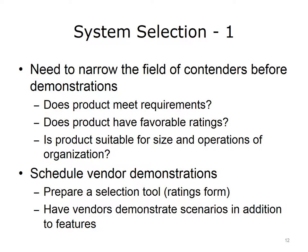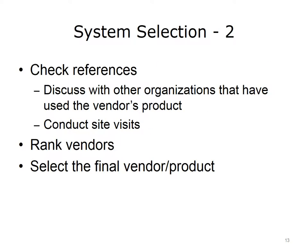During the demonstrations, ask vendors to simulate a variety of clinical scenarios in addition to system features. Requesting the same scenarios from each vendor allows identical workflows to be compared. It is also important to check the vendor's references during the selection process. Find other organizations that have used the vendor's EHR product to get third-party impressions of both the vendor and the product. The vendor may have a list of customers who can serve as references. After product demonstrations have been completed, the organization can begin to rank the vendors using a robust selection tool that employs objective evaluations rather than subjective interpretations.